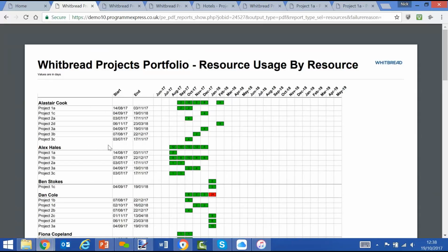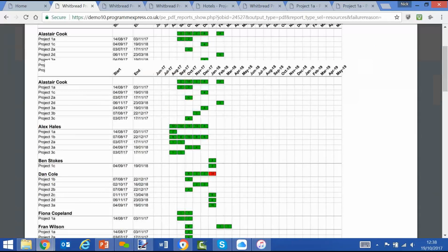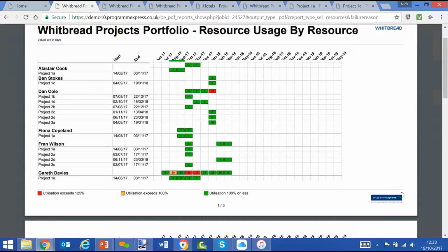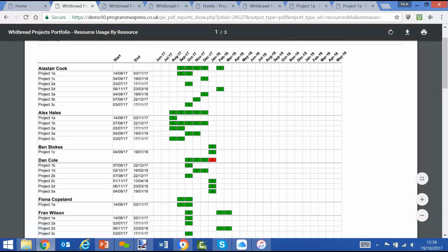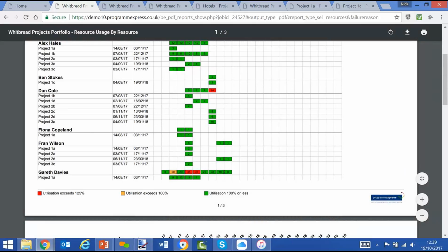It will automatically move as the plans move, and it shows all your resources, the number of days that they're working on specific projects within a period, in this case monthly, it could be weekly, what they aggregate up to in total on projects, where there is potentially an out of tolerance, where somebody's been over allocated, and that would be more than 10%, and then more than 20%, or whatever tolerance level you set up, and that will determine amber or red status.